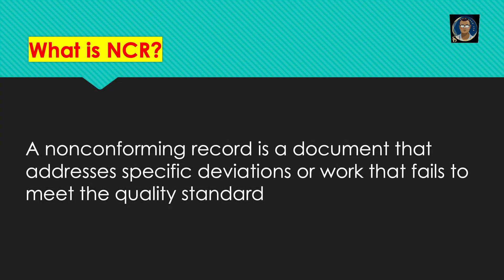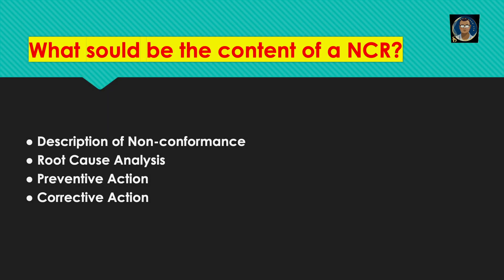What is NCR? It's a very easy question but we should know a proper definition. A non-conforming record or NCR is a document that addresses specific deviations or work that fails to meet quality standards. What should be the contents of an NCR? Description of non-conformance, root cause analysis, preventive action, and corrective action.